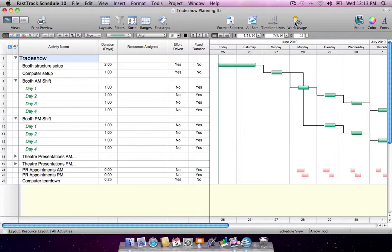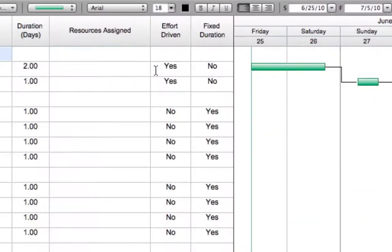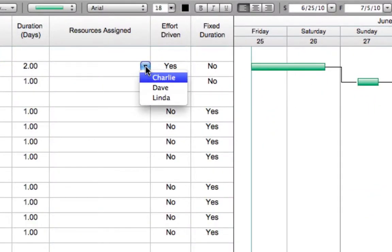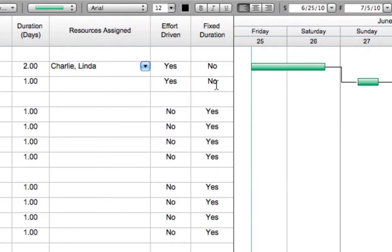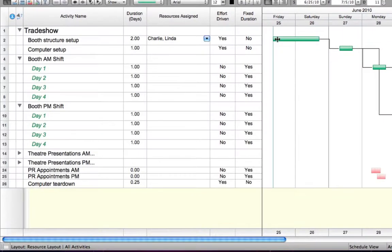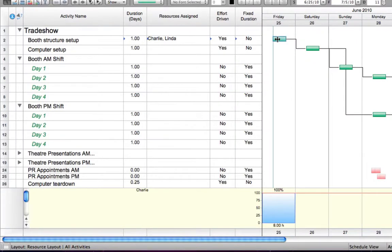For tasks that can be completed faster by adding more resources, use effort-driven scheduling for simple schedule compression. As resources are added or subtracted, task durations are automatically adjusted while keeping the total work for a task constant. Use the resource percent work usage graph to instantly identify scheduling conflicts.